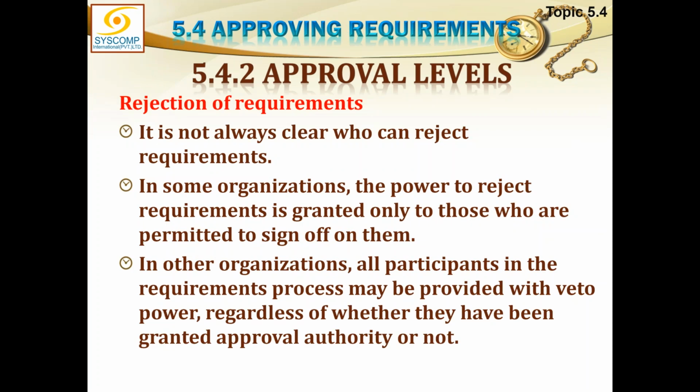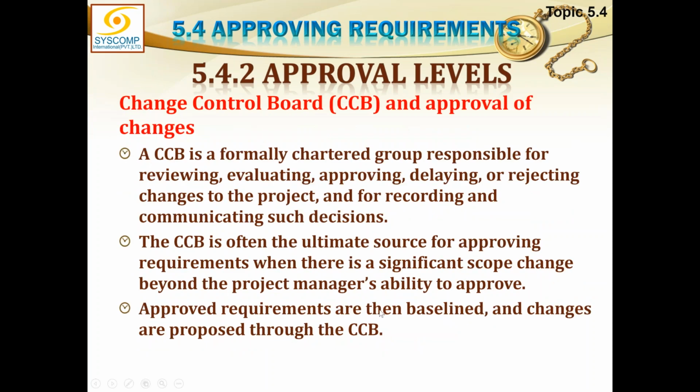Rejection of requirements. It is not always clear who can reject requirements. In some organizations, the power to reject requirements is granted only to those who are permitted to sign off on them. In other organizations, all participants in the requirement process may be provided with veto power regardless of whether they have been granted approval authority or not.